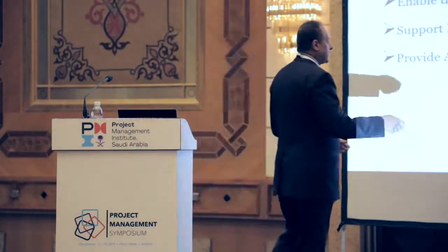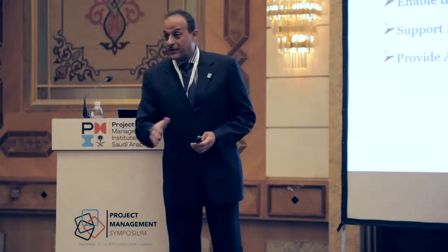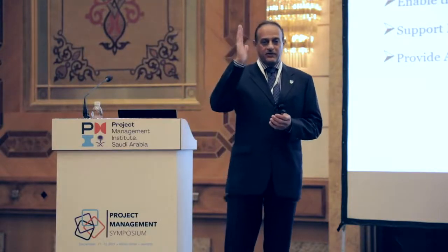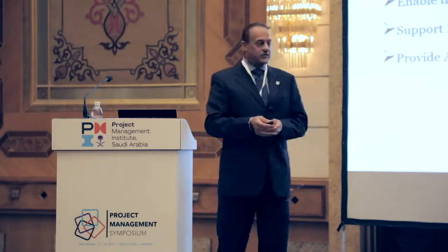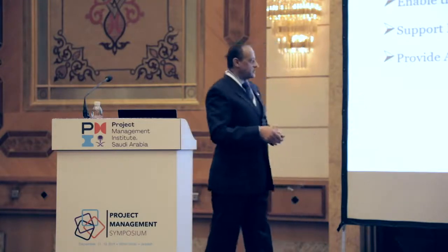Where a lot of people think that the project is done after preliminary design, which is the final investment decision. In fact, that decision gate is deciding whether that project is good to do now. It must have been decided that it's a good project, but maybe the market conditions changed, and then the corporate will say, well, during that final investment decision, we'll proceed with it or not proceed with it. So these are essential gating systems to help you.